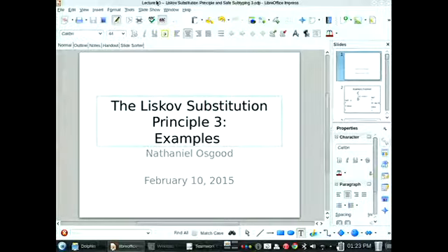And as far as deliverables involving CPM diagrams, what I would love to see, and this is not something I'm saying is absolutely essential, okay, is some thought as to what the tasks are in a given deliverable and what their dependencies are between them. What depends on what. If you need to get Merlin to set up this VM so that you can install a build server, so that once that build server is installed, you can install CruiseControl on it, and so on, and you've got a series of linear dependencies, that has a lot different implication than if you can do things in parallel. And I'm asking for some thought about what the critical path is.